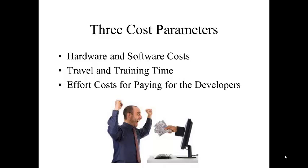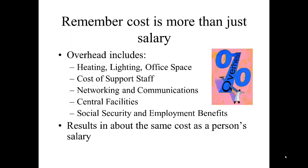Hardware, software, training, and travel tend to be relatively low compared to the cost of paying your developers. Remember that cost is more than just salary — you have overhead including heating, lighting, cooling, office space, cost of support staff, networking and communications, central facilities, social security, employee benefits, and healthcare coverage. The overhead cost results in about the same cost as a person's salary.